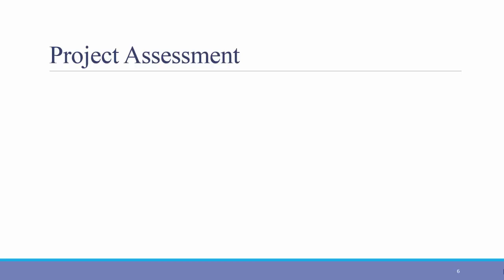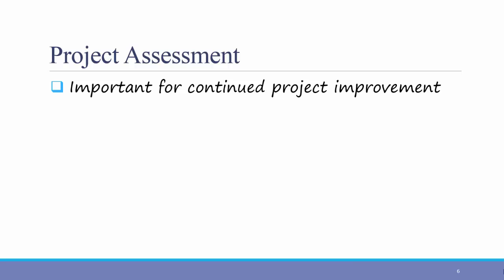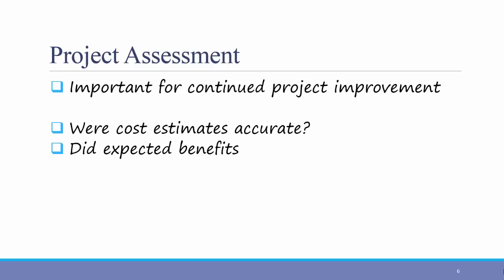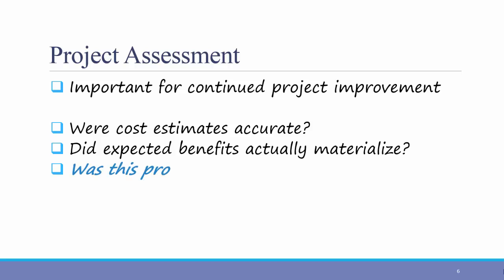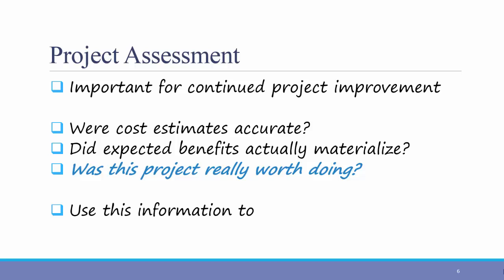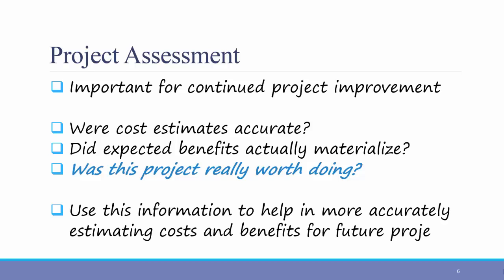Finally, it's important to assess the project. This is important for continued project improvement. Project assessment isn't common in every organization, but it should be. At the end of the project, the project manager should assess whether the cost estimates were accurate, whether expected benefits actually materialized, and whether the project in the end really was worth doing. This information can be used to more accurately estimate costs and benefits in future projects.